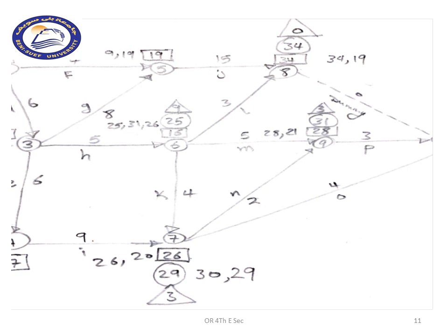So when we compare these times, we will select the lowest amount, which is 25, in order to represent the latest allowable possible starting time for node number 6, which will give us 9 weeks as slack time between the earliest possible start and the latest possible start.